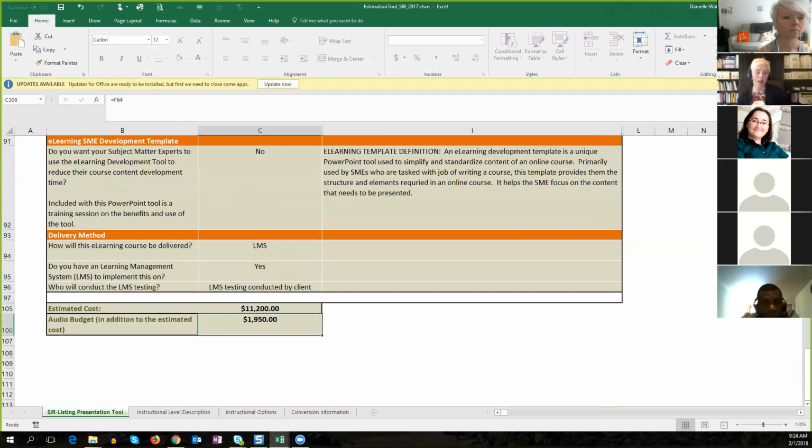And so what we do is for audio, we give a budget. And then in the statement of work, we say, if you don't use this budget, we don't charge you for it. So we estimated for a very large project, like a $3,000 audio budget. And I think we ended up using $2,000 of it. And so we only charge for $2,000.